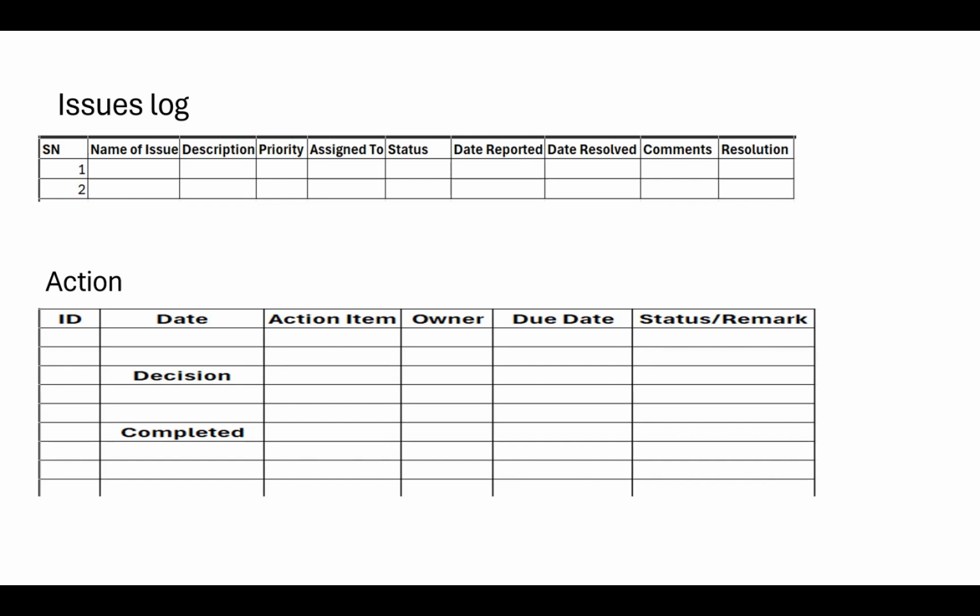As the project is ongoing, you keep on analyzing your risks and keep adding your risks, bringing your mitigation. If any is closed, you close it down. If any is passed, it cannot happen again, you say that one is passed. But in case any risk manifests and there is a technical glitch, it is no longer a risk. It now becomes an issue.